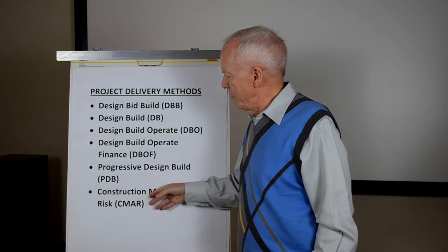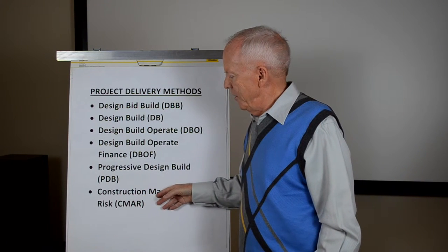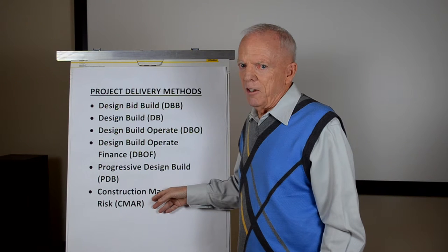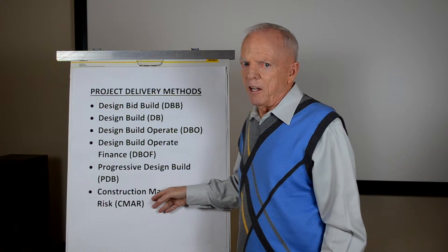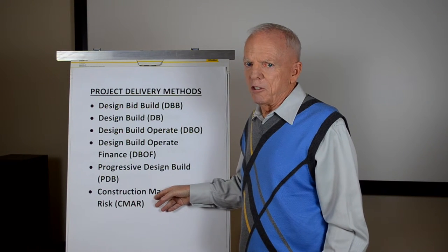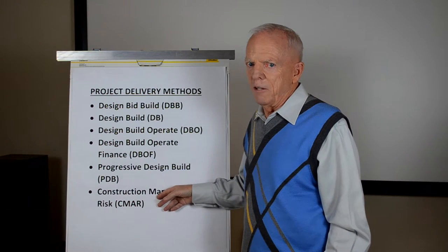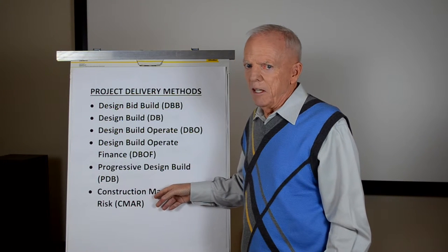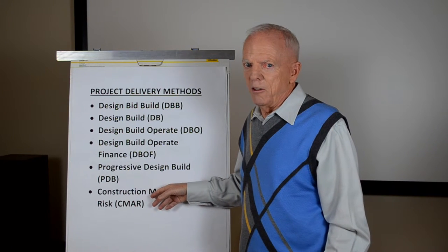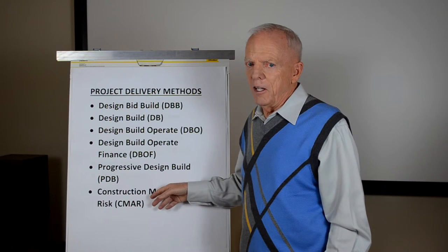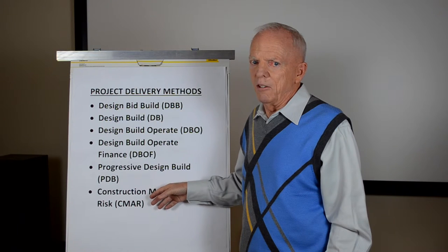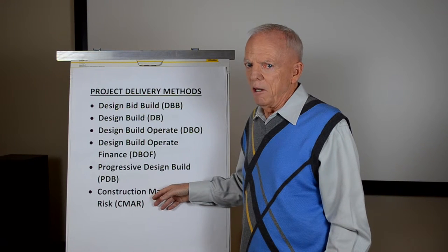Construction manager at risk: the owner hires a designer and a separate contract with a construction manager who handles the construction aspects. These two entities work together during project design, and again, at about 60% they come up with a guaranteed maximum price.